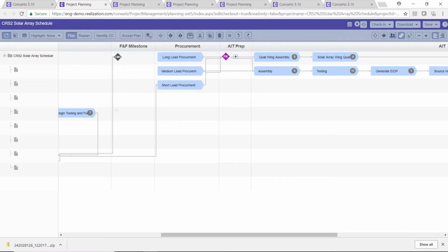Now the next thing was, as we prepare for the assembly and test, typically they would get a few parts in from the vendors, and they would start setting out their area on the floor, and they would start building. And before they knew it, they had a lot of projects going on, and they were completely out of floor space on the shop. So now, if something was to change, they were stuck. Their floor was full. These are big projects. They couldn't just decide to put one to the side and start another project.